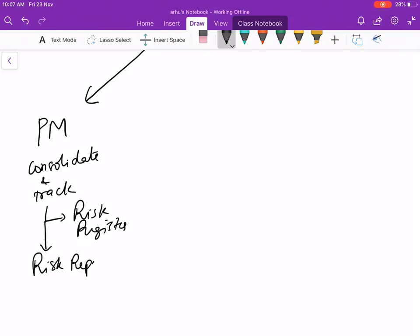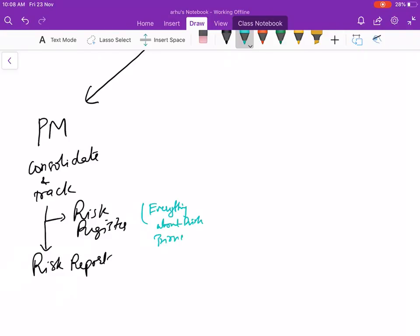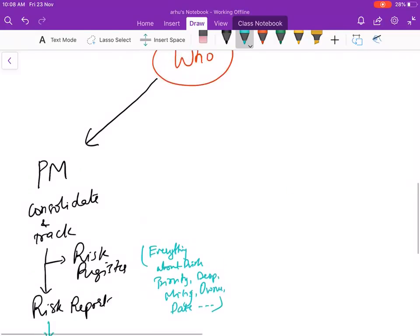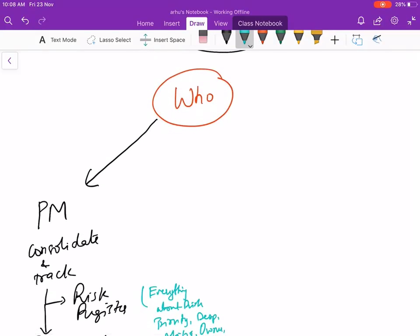The difference between a risk register and a risk report is the risk register has everything about the risk - like priority, description, mitigation, owner, the date when the risk is identified, and many more things. The report will actually tell you primarily what is the source of the risk - is it from the scope, schedule, technology, or is it a legal risk?